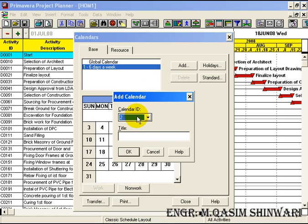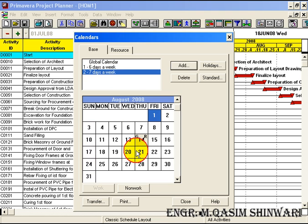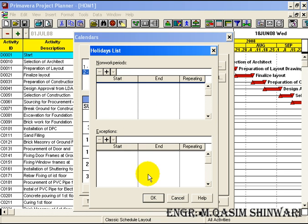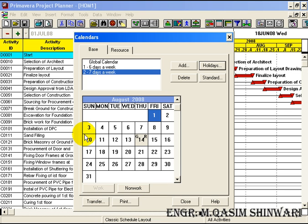Now add another calendar. Let the calendar ID be 2 and its title will be '7 days a week'. Click on OK. In '7 days a week' we will have no holiday — you can see no holiday, and even Sunday will be counted as a working day.